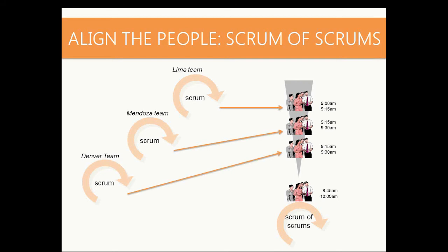And if we turn to the next slide, then I've mocked it up. So the data you see here is totally made up, but this would be an example of the brief report that I would be using. Quick summary of what happened during a sprint, what was delivered, what's concluded, what's going on, what are the challenges, the blocks, if you like, where is help needed, and then highlighting some major decisions.